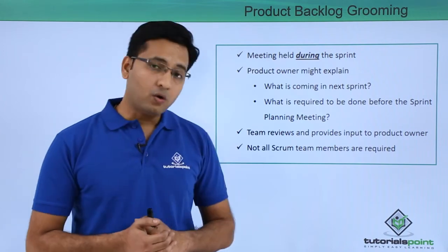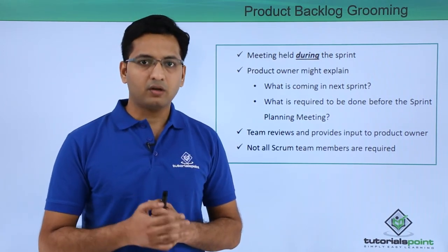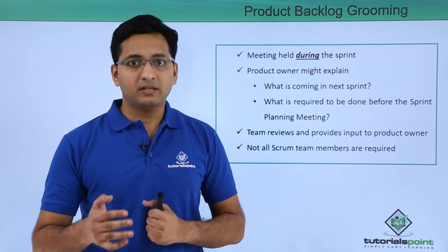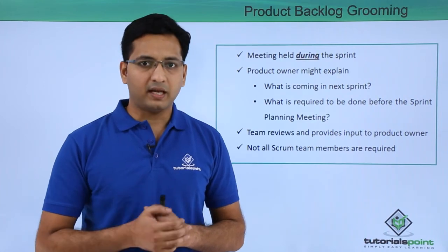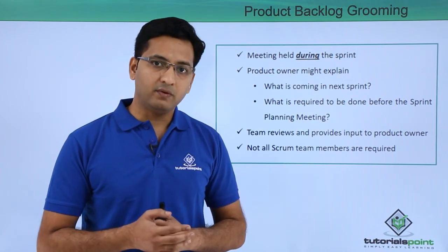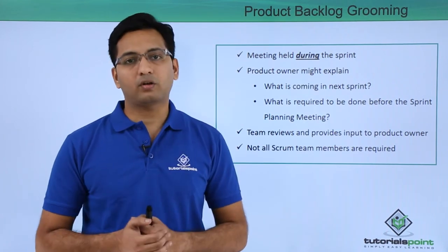Lastly, not all Scrum team members are required. For instance, in many cases, the product backlog grooming meeting doesn't have the stakeholders involved. Also, many a times the meeting can be just between a Scrum Master and a product owner. That is all about the product backlog grooming meeting.